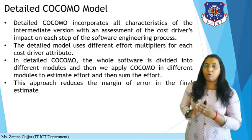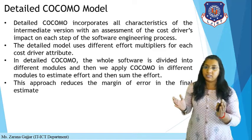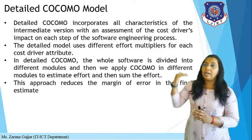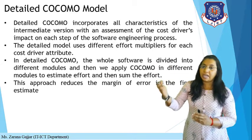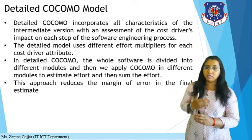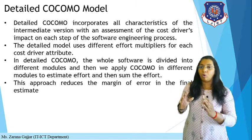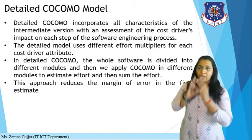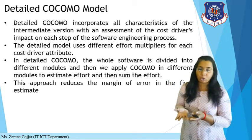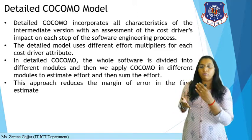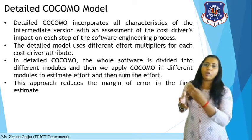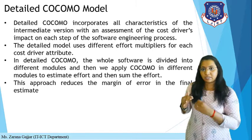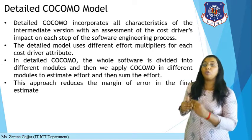In the first lecture of Unit 1, we discussed the SDLC — software development lifecycle — which has various phases: requirement gathering and analysis, designing, coding, testing, and maintenance. The detailed COCOMO model goes into detail for each and every phase. Once requirements are gathered and analyzed, you finalize the actual requirements and then develop the project further. Each phase is calculated separately for cost.